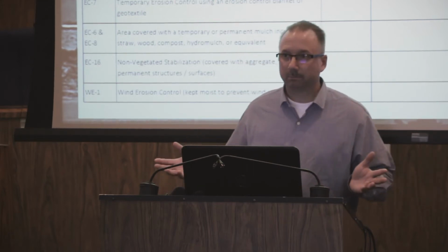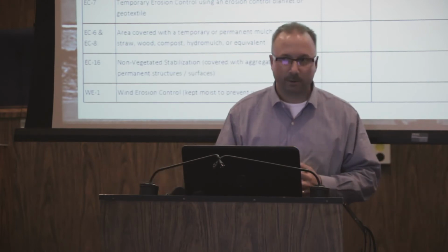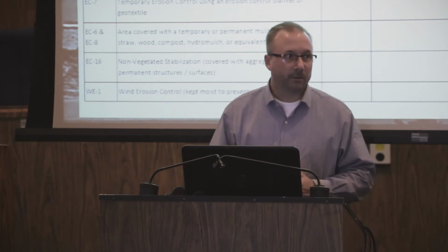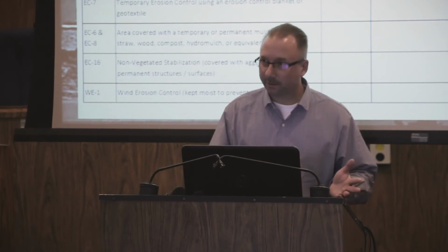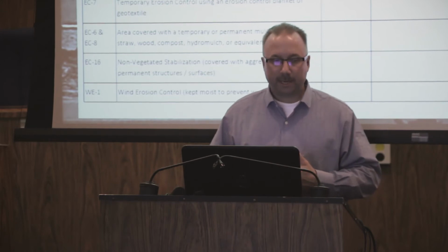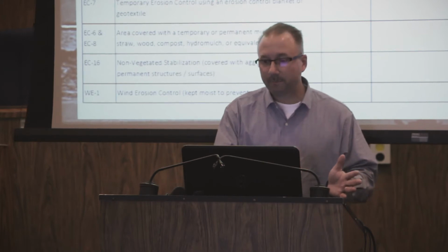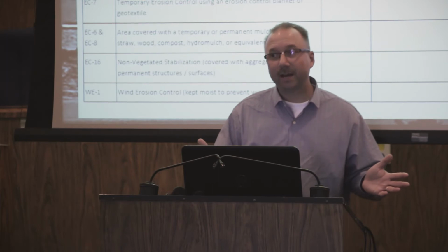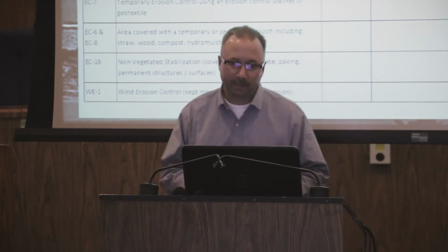Now, is that mandatory? No. City ordinance is not saying you must grade during the dry season. You still can do grading during the wet season. But the point is, it's a good best management practice and something they should consider. And so if their schedule works out, or they can work it out so that they get that done early, or even the whole project done during the dry season, then great. That's a fantastic BMP. It'll probably save them a lot of other headaches that they may have.